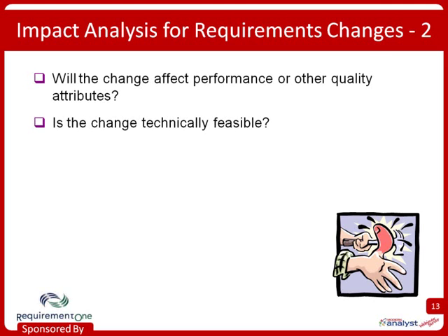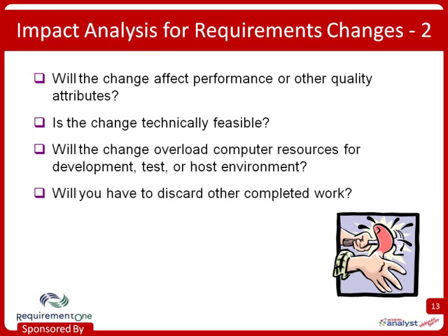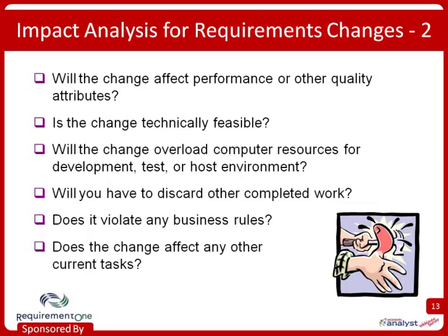Is the change even technically feasible? Will it overload any of our computer resources that we have in various environments? Will I have to throw out other work that's been completed if we put this change in effect? Maybe that's not a good business decision. Would it violate any business rules that apply to this project or aspect of our business? And does the change affect any other tasks that are currently in our plans that people need to be notified about so they understand the implications?